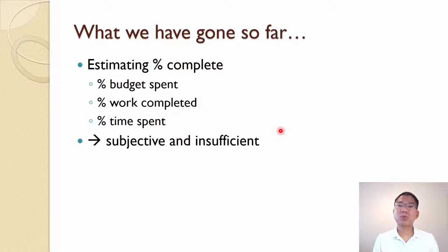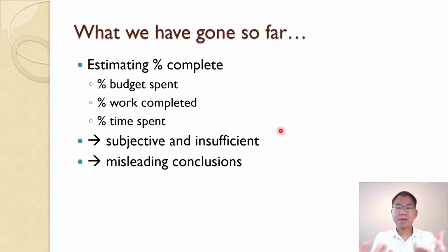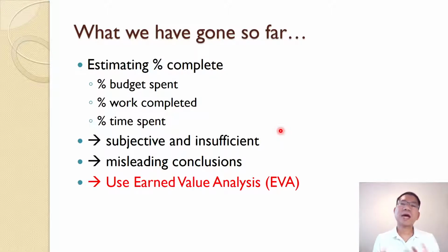from time to time. So with that, when the input percent complete is subjective and insufficient, we may provide a misleading conclusion. For example, the project may actually be behind schedule, but with our estimated percent complete, we may finally say that it is ahead of schedule. So that may be a misleading conclusion. So earned value analysis may help in those scenarios, and that is the purpose for the remainder of today's class and the next class: earned value analysis.